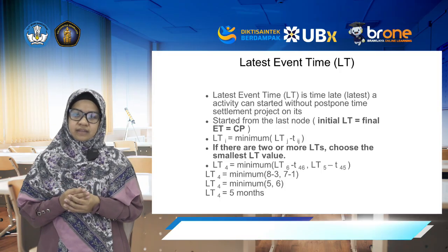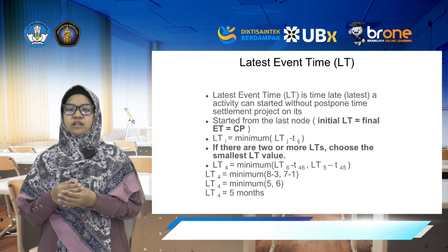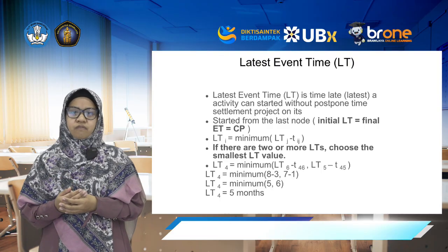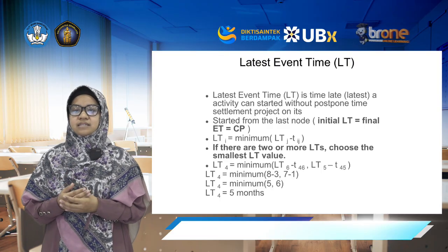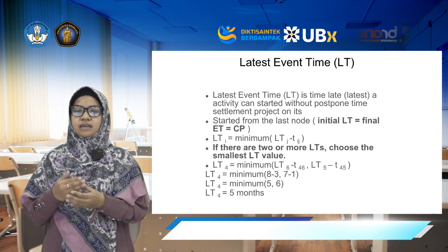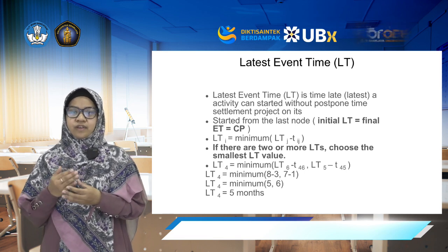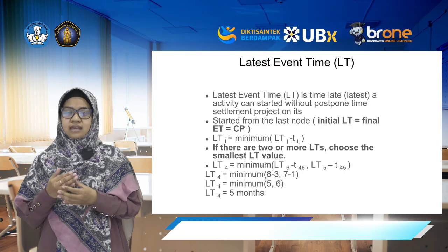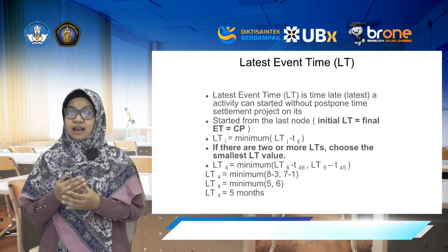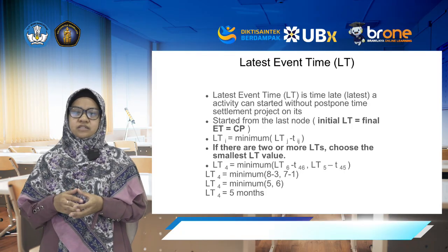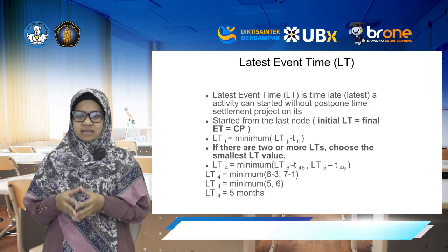For each activity, let us start with LS equal to LF minus duration. For its predecessors, the LF is the smallest LS among their immediate successors. When you finish, every activity has an ES, EF, LS, and LF. With these four numbers, slack is easy.